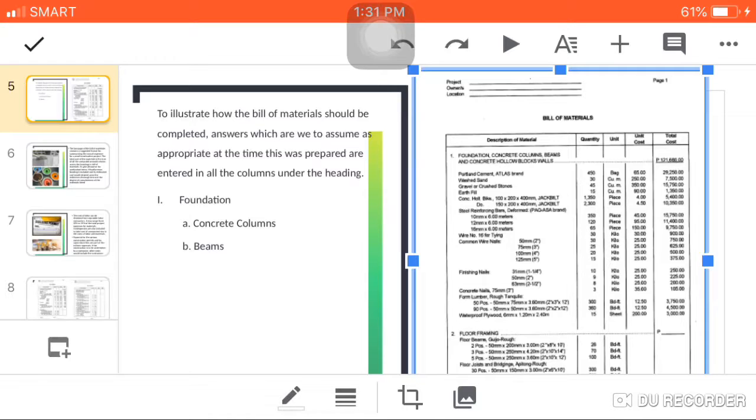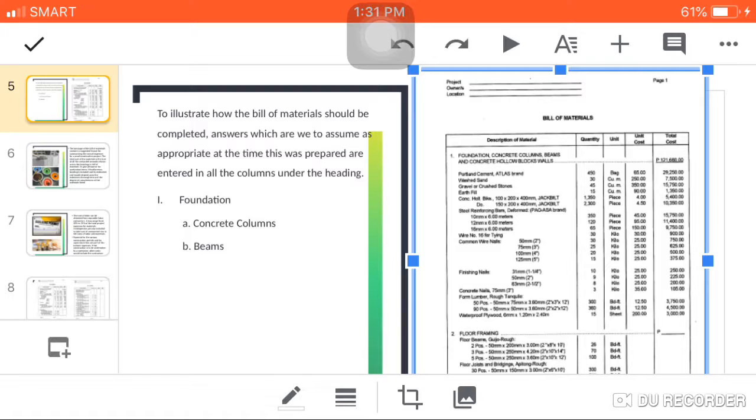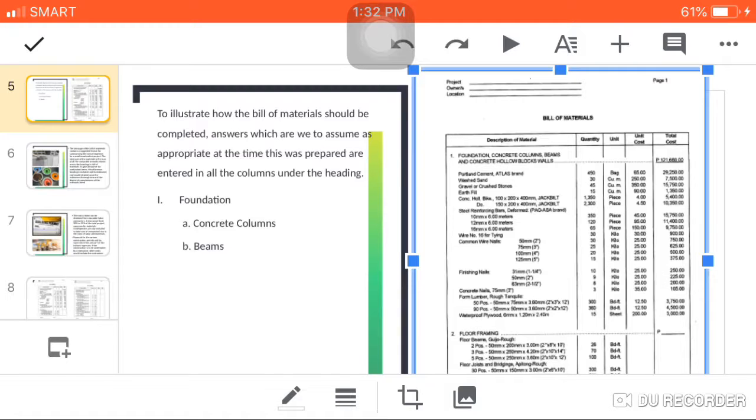For the unit cost, this is the price prevailing based on time or based on the value in the market. And last is the total cost. It is simply the quantity times the unit cost to get the total cost of that specific material.